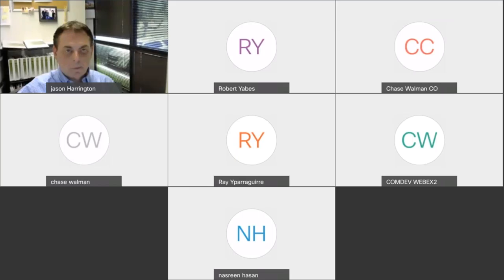We have our internal review as well as other stakeholders like ASU Research Park or various city commissions like the Sustainability Commission or Transportation Commission. Once we get the feedback from the public and all those stakeholders, we'll come back out to the public for a second round of public meetings to show that refined design in early 2021. We anticipate finishing the design phase at the end of 2021 and beginning construction in 2022. Again, it would probably be a minimum of 8 months, just comparing it to some of our other projects, but we don't have a timeline yet as far as how long the construction would be.